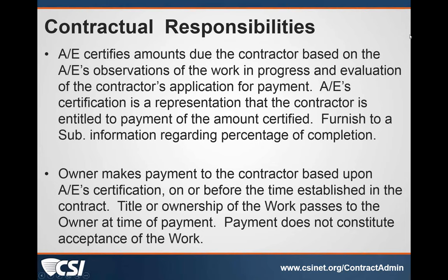So I did want to mention briefly joint checks. Oftentimes we will see where an issue arises where a subcontractor or a contractor in some cases may ask the owner to issue a joint check. I just want to comment that I would never make that recommendation to the owner to do that, but I also would not oppose it. That's something that needs to be worked out between the owner and the contractor. It can be useful in helping to keep the project moving, to keep money flowing to where it needs to be flowing to, but it's not something that I would want to be liable for making a recommendation that a joint check be issued to a subcontractor or a supplier.